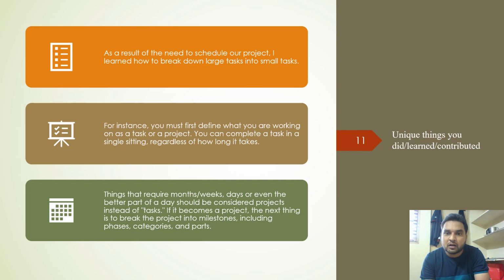These are the unique things I learned and contributed. The first one, as a result of the need to schedule our project, is that I learned how to break down a large task into small tasks. For instance, you must first define what you are working on as a task or as a project. You can complete a task in a single sitting, regardless of how long it takes. Things that require months, weeks, days, or even the better part of a day should be considered projects instead of tasks. If it becomes a project, the next thing is to break the project into milestones, including phases, categories, and parts.